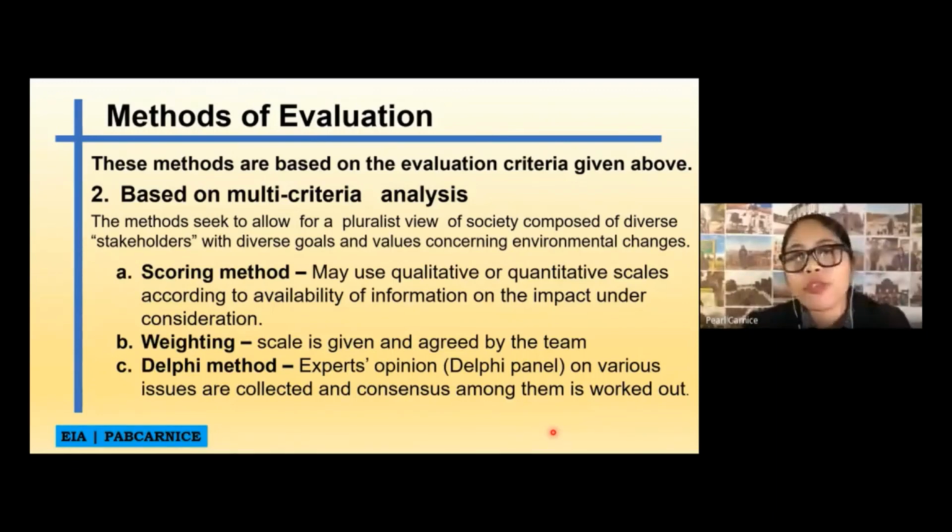And of course, we can use the Delphi method. This is where expert opinions, or the Delphi panel on various issues, are collected and a consensus among them is worked out. This is the one that I was trying to explain to you earlier. Again, for example, you have a set of questionnaires on the predicted impacts of your specific project or activity, and then you give out that questionnaire to the panel of experts over several rounds. On the first round, it's the same questionnaire, but you can shuffle the questions.